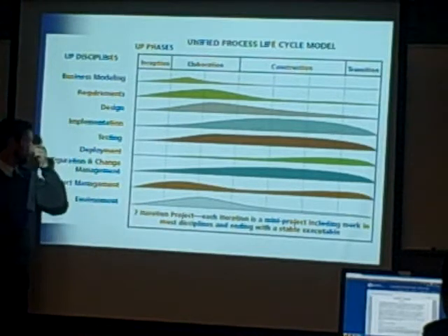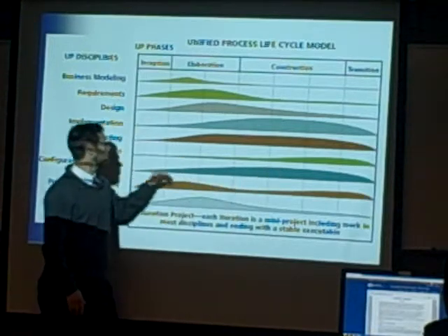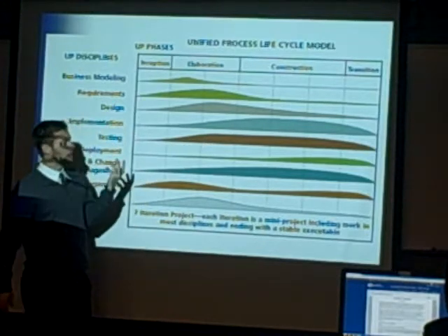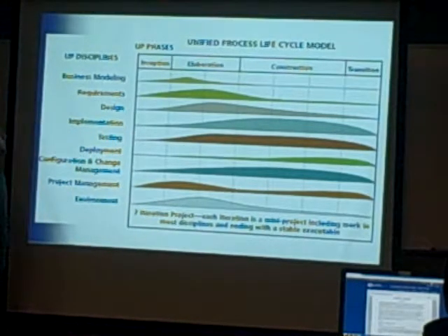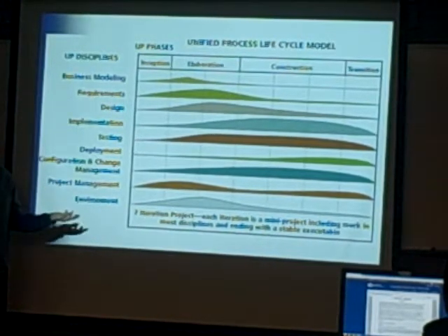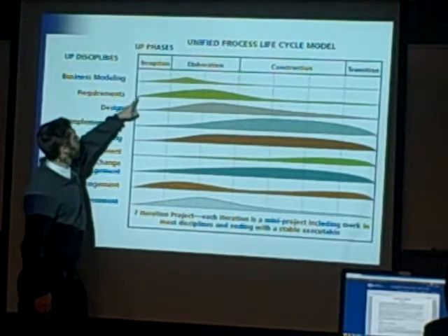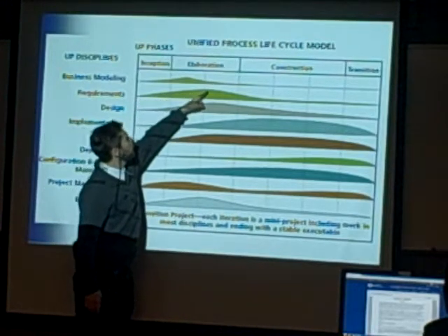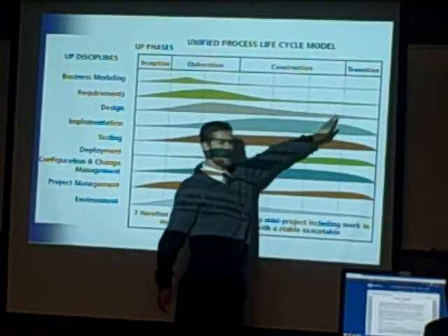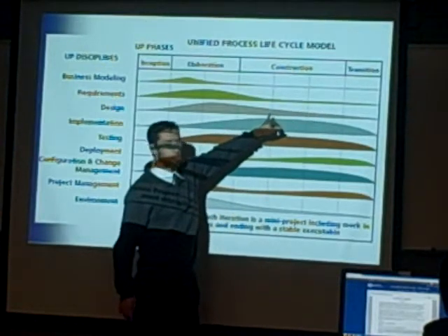to deliver a working iteration of software at the end of that. Furthermore, as you move farther and farther into the project, you need more of some types of skill sets the later you get into the project and less of some others. And that kind of makes sense. For example, one skill set you need is to collect requirements on what you're supposed to be doing in your system or the project that you're delivering. So it makes sense that early on you ramp up pretty quickly collecting requirements, and by the second half of the project you shouldn't be collecting requirements anymore. This one's saying, well, you might be doing a little bit of that, but it should have tapered out by then. The bulk of your work was early on.